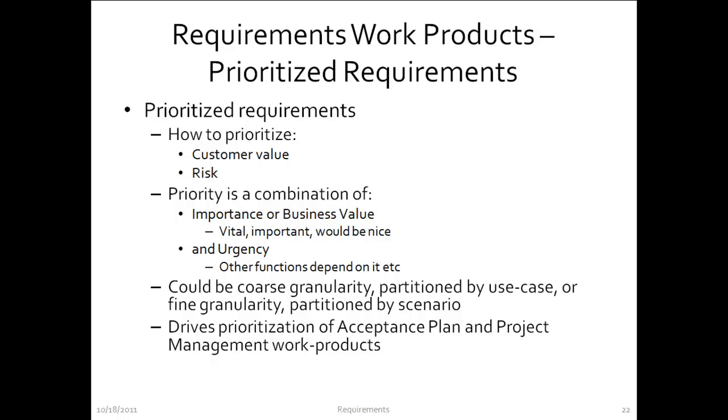Now, when you prioritize requirements, you can prioritize them at a coarse granularity by use case and by non-functional requirement, or you could prioritize at a finer granularity, which is by scenario within a use case. And even the non-functional requirements can be prioritized in a more granular manner. For example, you can have non-functional requirements attached with certain use cases that have to be implemented first, and so on.